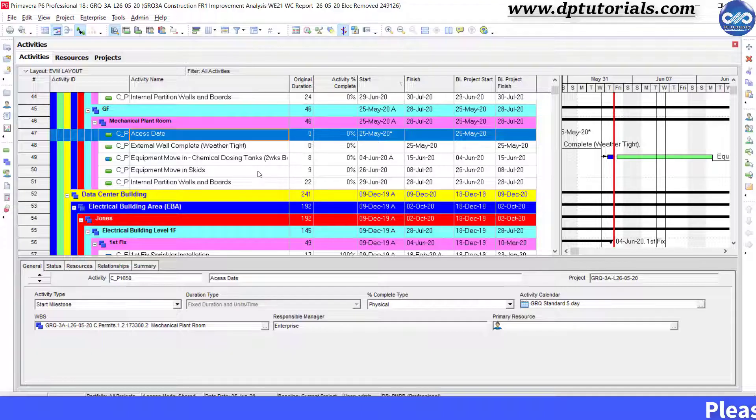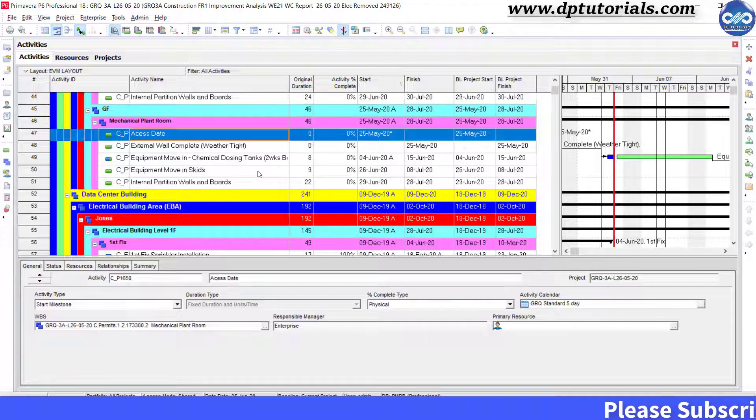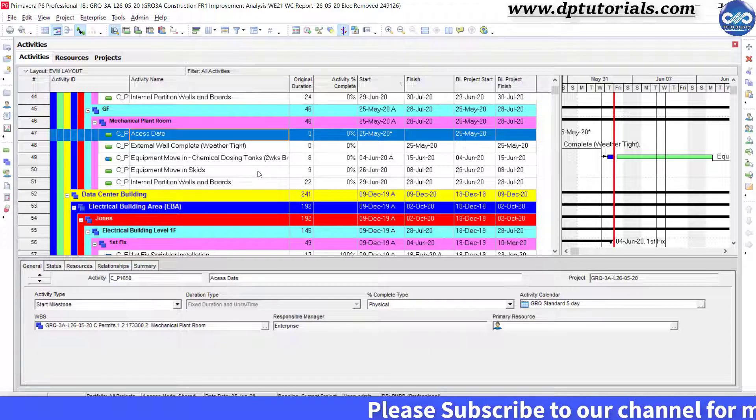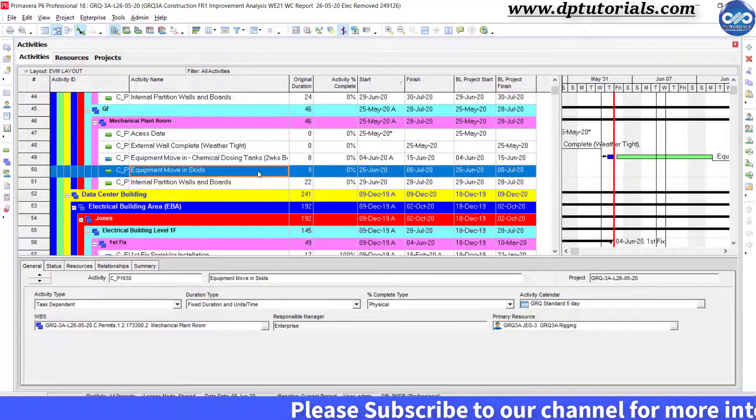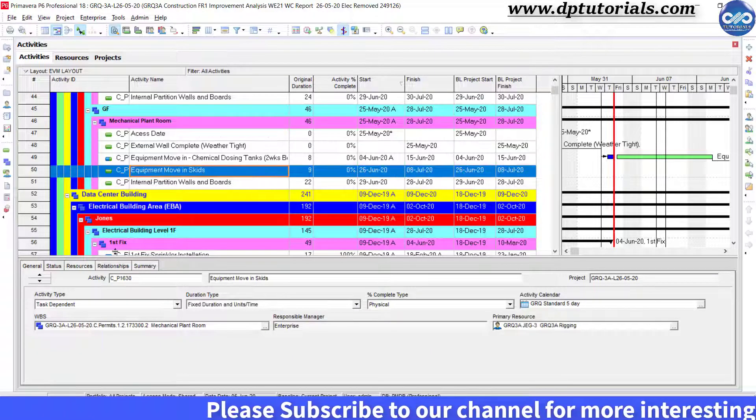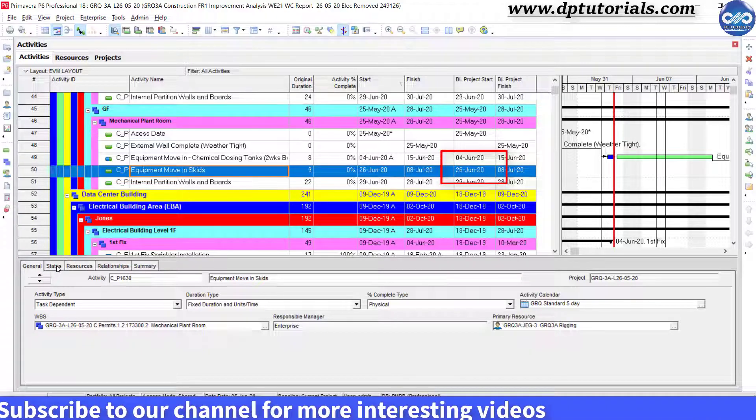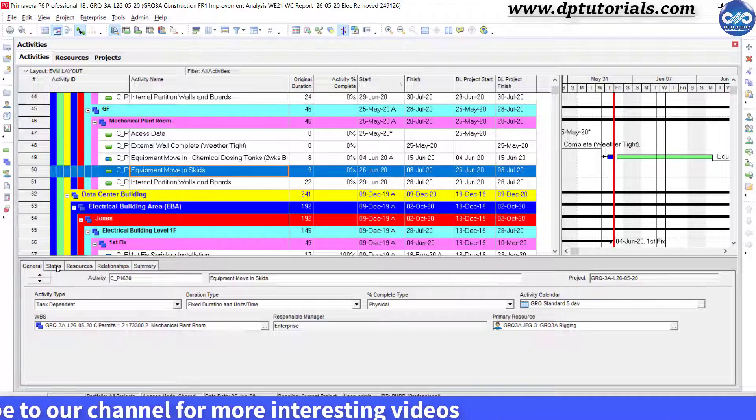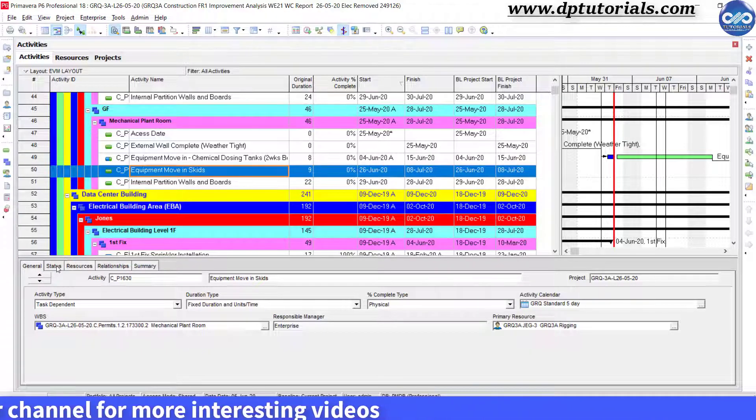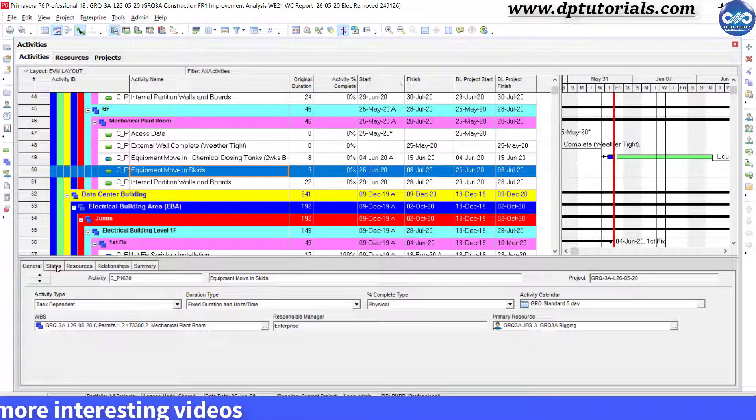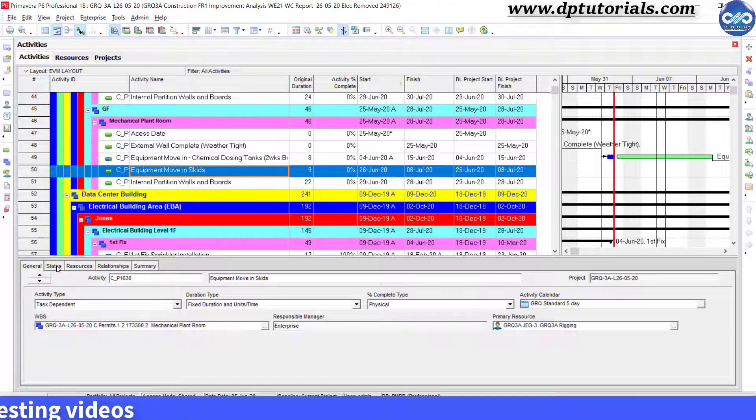So the ideal method is to update manually. Like, for example, the activity Equipment Move in Skids is supposed to be started on 26th June. Suppose it has started on 15th June 2020, and I am updating it manually like this.